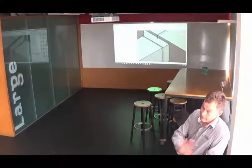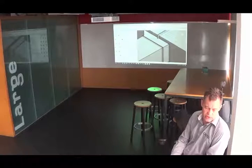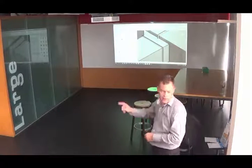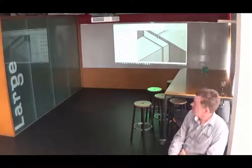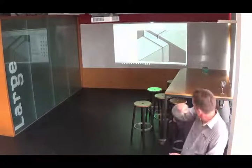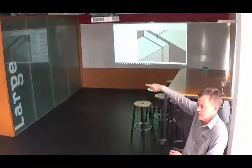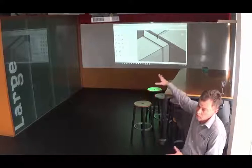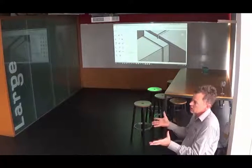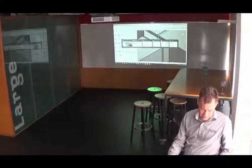And so when you've fluffed around with it in here, you can export this out as an image file. So under the add-ins, you'll see. Now, if you're in 2016 or earlier, 2015 I think, you can do this store design line elements, and they're storing graphic elements, and you can store those, and they go out as a RIF file, and they will import into the estimator. All it does is the centre line of, say, the ductwork or the pipework, and the sizes, and it changes all the way along. And when you reconstruct it in the estimator, it rebuilds it according to the fabrication data, which is level 400 or whatever you like to call it. So that's what it looks like there.